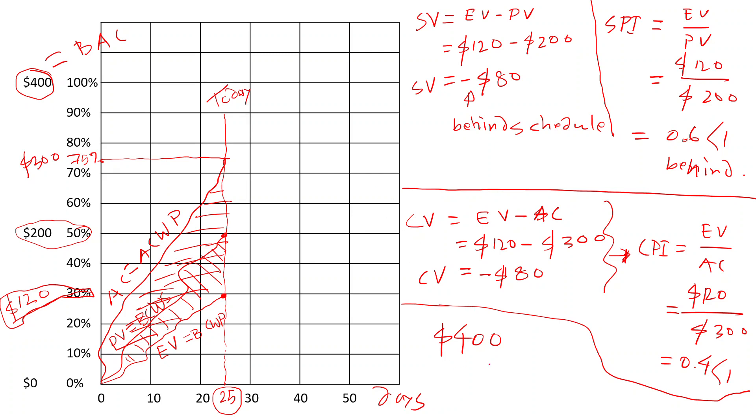A quick rough estimate of this project. If we continue at a rate of 0.4% or 40% CPI, 0.4, then it's going to be about $1,000 to complete this project. This is known as the EAC, estimated cost at completion.